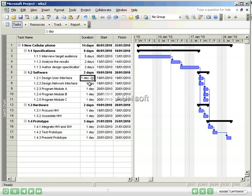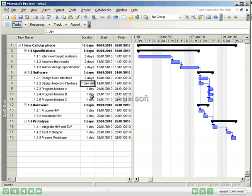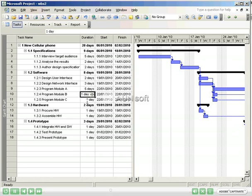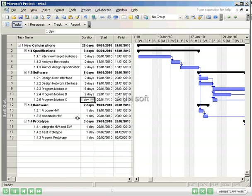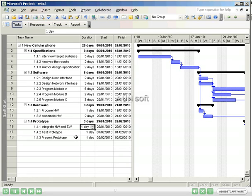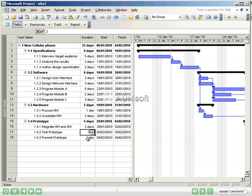Design user interface, two days. Design the network interface, three days. Program module A, five days. Program module B, two days. Program module C, three days. To procure the hardware, one day. To assemble the hardware, two days. To integrate the hardware and software, three days. Two days of testing for the prototype. And one day to present.